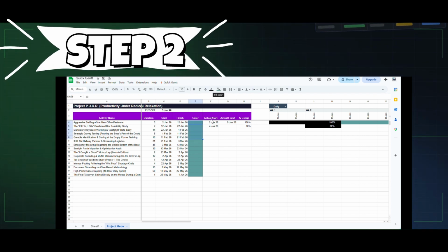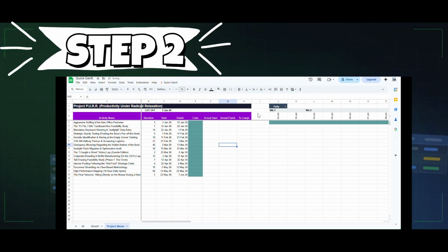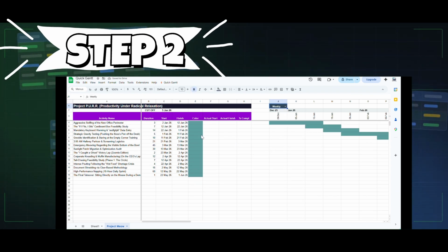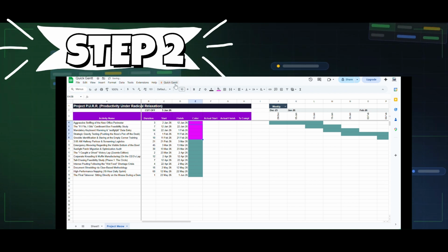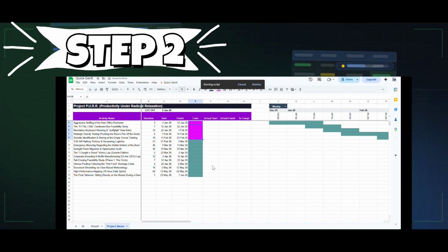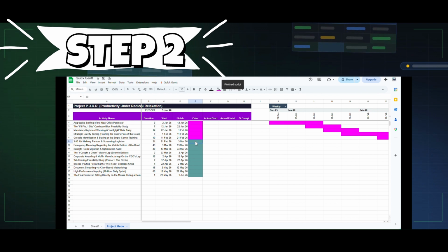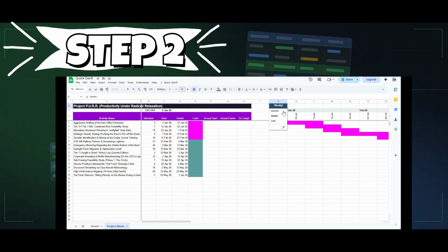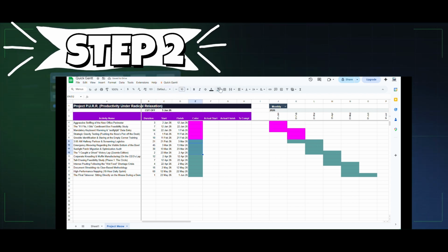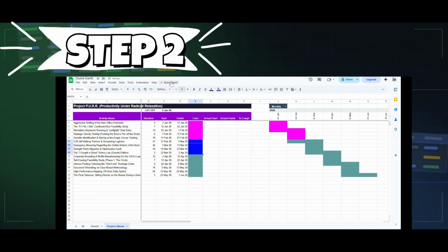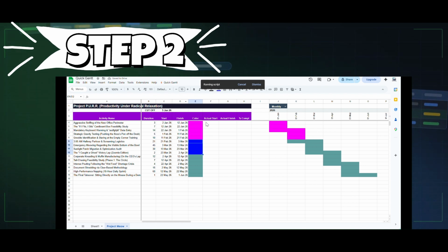Next, we see how to change Gantt bar colors. In Color column, select the activities and set the color of Gantt bar. Once set, go to Menu, Sync Color, and that is it. Color is changed. You can do these changes any number of times. You can easily use this feature to assign different colors to phases of project or teams or manager.